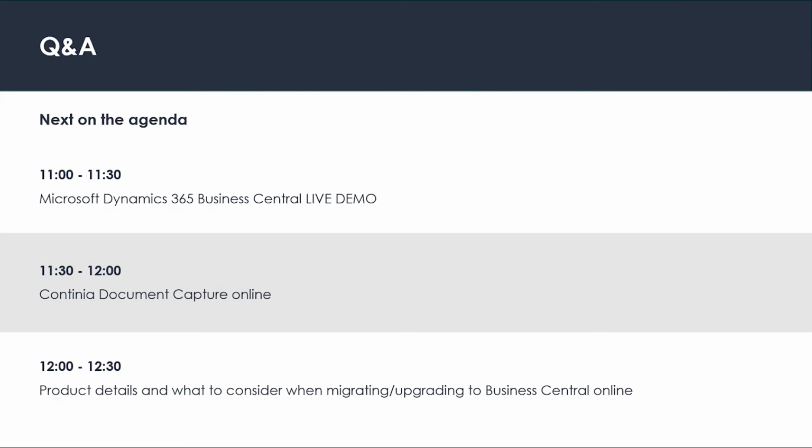I would also like to add a comment. We used the chat function in Teams during testing. Previously, you would log tickets when you do your user acceptance testing, and then you had quite a lot of administration around just getting a response on tickets. Here, by using the Teams chat, we were able to get a response back from the consultant within 30 seconds when we ran into an error when testing. I think that made the testing extremely efficient compared to what I have been used to. For me, that was a key success factor, considering the short timeline. It was almost like sitting next to each other, just chatting and talking using the chat function.